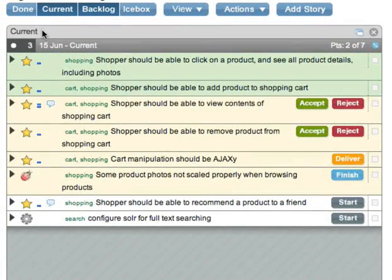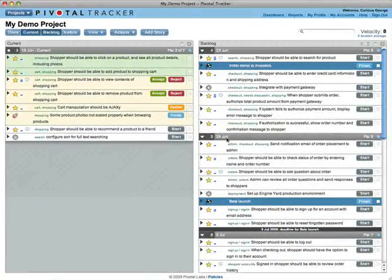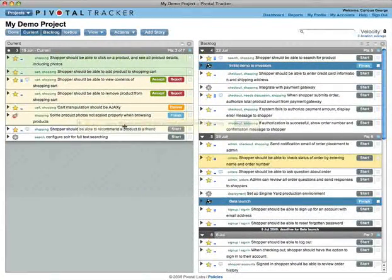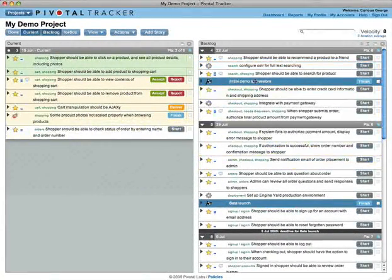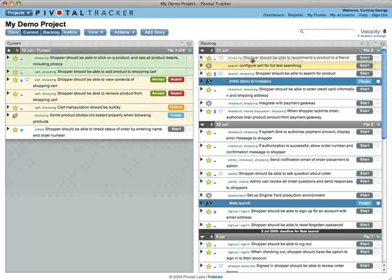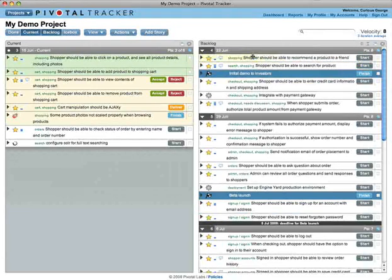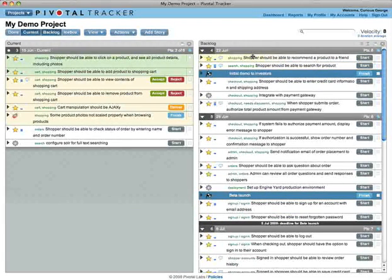This is where you look for what to do next. Stories sometimes fall out of this panel or jump into it from the backlog. That's because Tracker dynamically allocates stories to current based on what will fit.